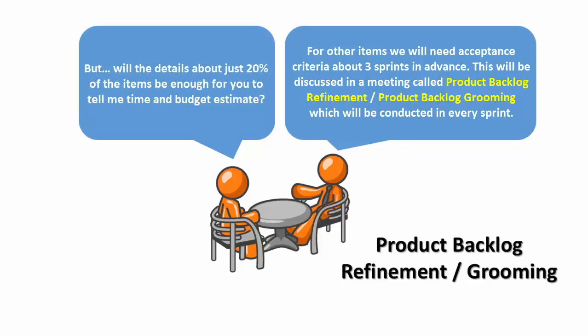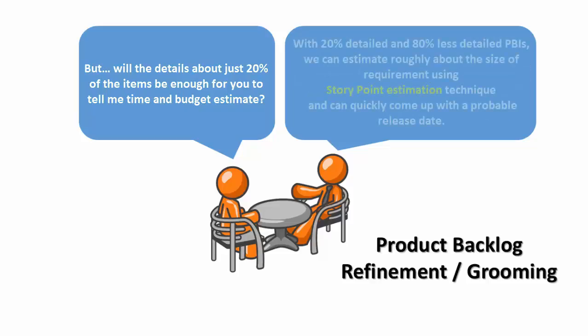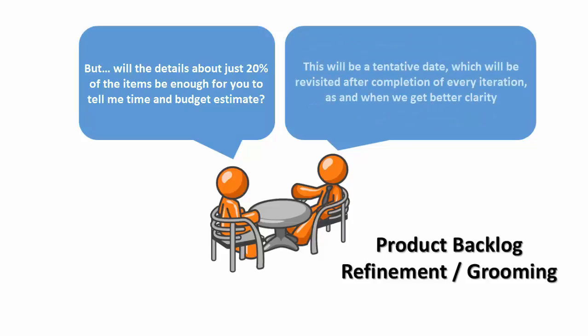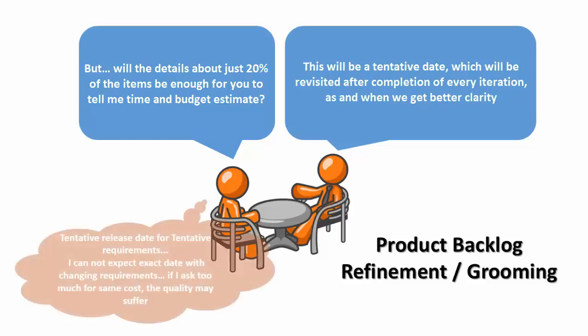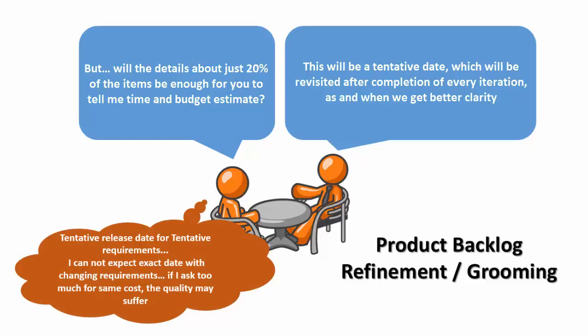But will details about just 20% of the items be enough for you to give me a time and budget estimate? With 20% detailed and 80% less detailed PBIs, we can estimate roughly the size of requirements using the story point estimation technique and quickly come up with a probable release date. This will be a tentative date revisited after every iteration as we get better clarity.